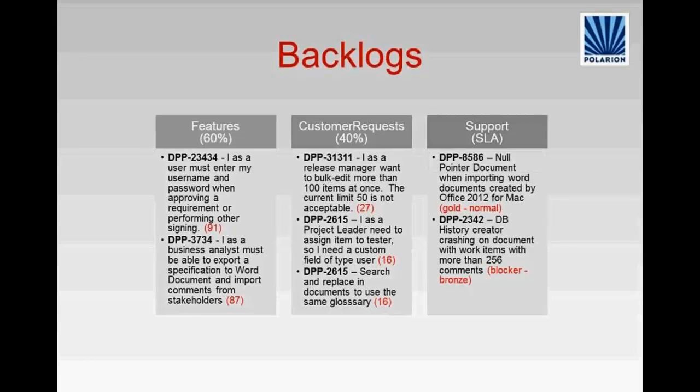We have a backlog that is related to performance improvements. And we just define a strategy how to spread the effort on each backlog separately. It's important that the actual priority number might be really different from backlog to backlog. So I don't need really to think about some hypothetical number to compare a defect and a feature together.